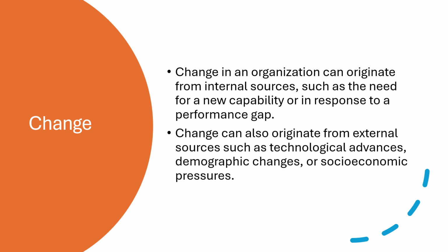Because a project is basically always creating something new. So a project is always changing something. Change management is a comprehensive, structured approach for transitioning the organization from a current state to a future state. Now, change management is completely different from a project change control. Project changes are where we are modifying the deliverables in the project.